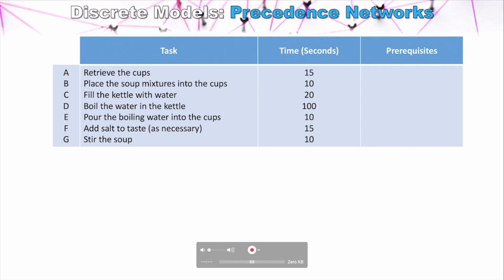Naturally, when tasks are simple, us humans are really good at being efficient. So this example of making some cup of soups — we can naturally see what order we should do these tasks in to be as efficient as possible. We're not going to just fill the kettle with water and sit there watching it boil while not doing anything else. A precedence network allows us to visually show the order of tasks and what needs to be done before you can commence the next task — which is what a prerequisite is.